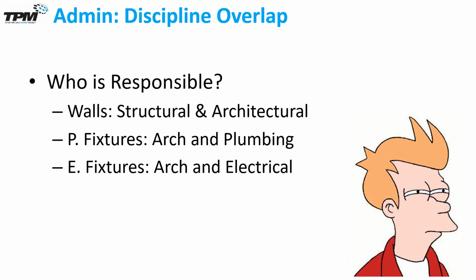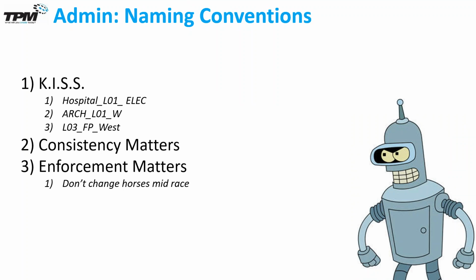That way you don't end up with duplicates, you don't end up with false positives, or with too much data or too many clash issues, because you really ultimately want the person who's in charge of putting it there to be the one responsible for making sure that the clearances are set and that everything jives with the rest of the coordination team.